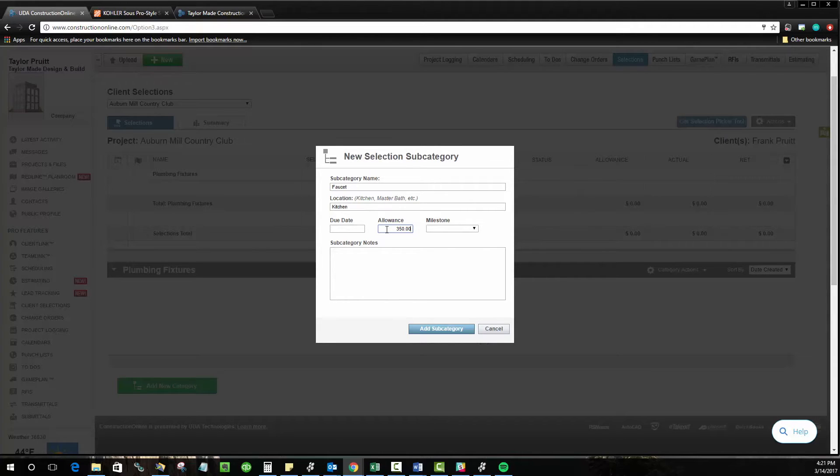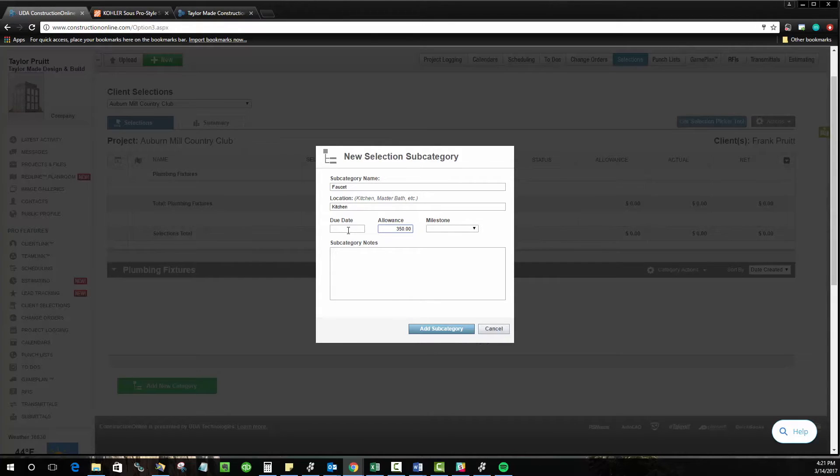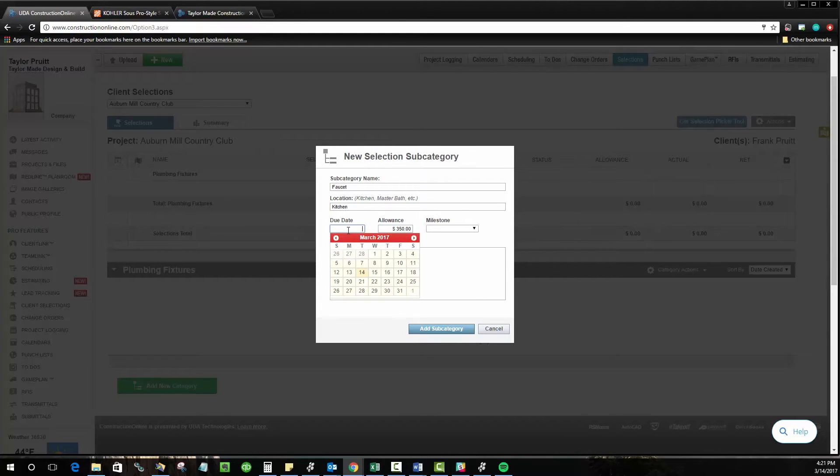As a builder, it's important that your clients submit their selection choices early enough to give you time to have the materials ordered, delivered, and installed without delaying your project schedule. So the due date's going to come in handy there.